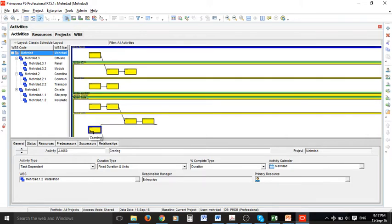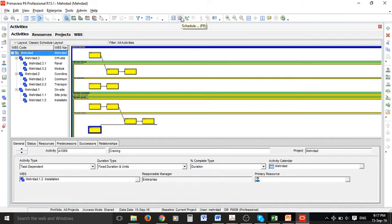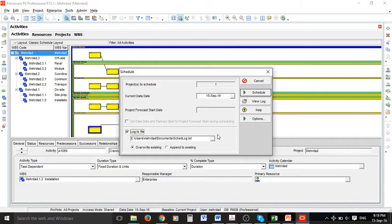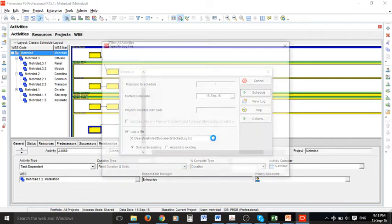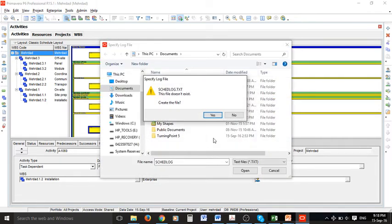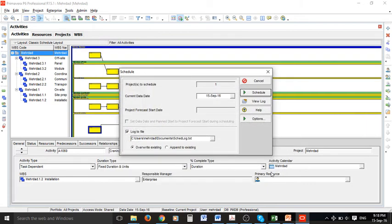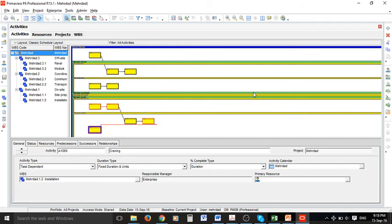So after finishing creating relationships between your activities you can run the scheduling for your project by pressing F9 or this button in the menu bar. When you do so this dialog box opens. There is an important option in here. If you check this box there will be a file created reporting on important features of your project. You can also define a location for saving your file. Now it is time to run the scheduling. And as you can see it is done.